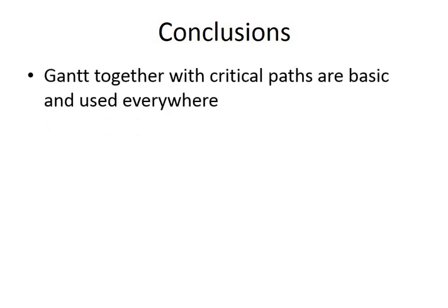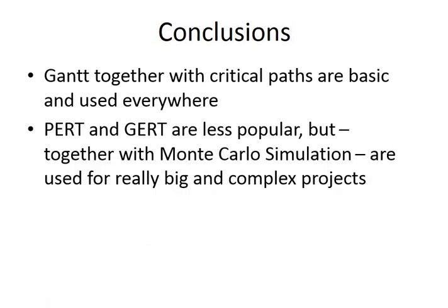So to conclude, Gantt and critical path are basic, and we use them everywhere. Whilst PERT and GERT and Monte Carlo simulation are used for big complex projects, for R&D projects, but such projects do exist, so sometimes we also need to use those techniques.